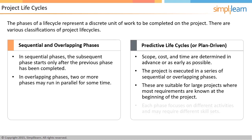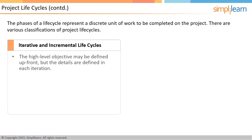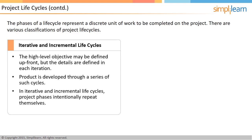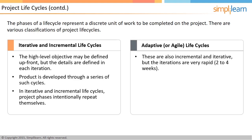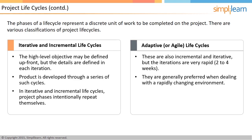Another feature of predictive life cycles is that each phase may require people with different skill sets. For example, traditional software development has phases like requirements, feasibility, planning, design, construction, testing, and transition. Incremental and iterative life cycles have a short upfront high-level definition and planning phase, and the product is developed through a series of iterations, where each iteration increments or adds to the functionality by a little. Adaptive or agile life cycles are variants of incremental and iterative life cycles where iterations are very short — typically two to four weeks. Agile methodologies are becoming very popular in software development and other industries where requirements are highly changeable and frequent feedback is beneficial.